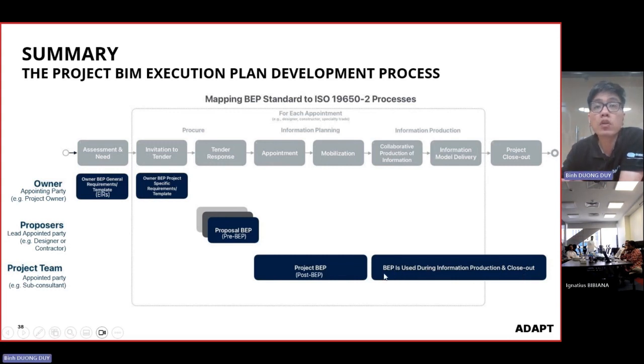So for the BEP, you have to consider this is the template, this is the standard, this is all the process, the big plan. And this could be a live document, meaning they keep updating it. If any change happens on the project, it needs to be reflected in the BEP first, and the stakeholders will come in to join and read that BEP to understand the requirements and the setup. So if you're working on NEOM right now, I suggest you try to find the NEOM BEP.